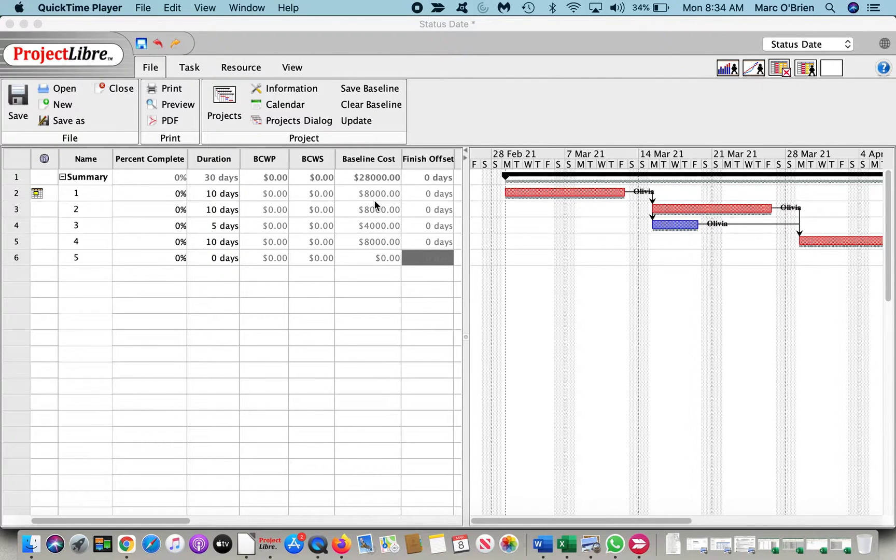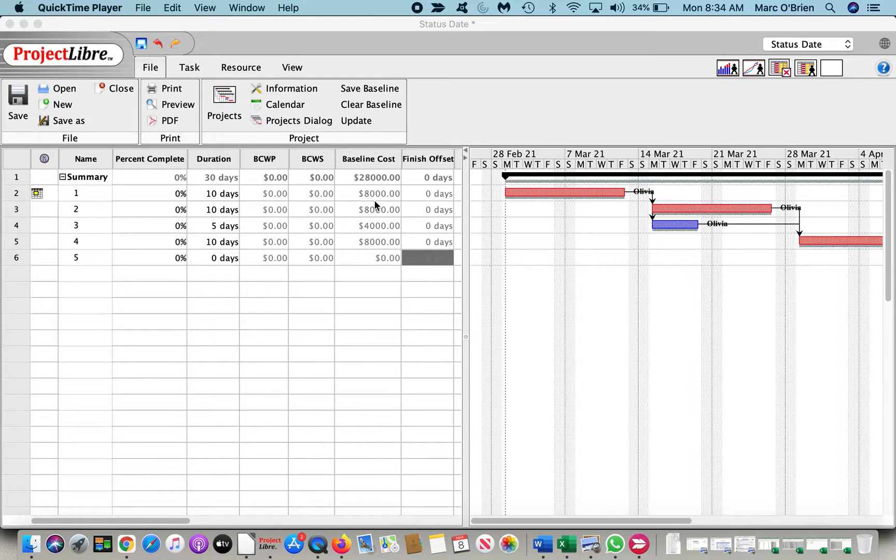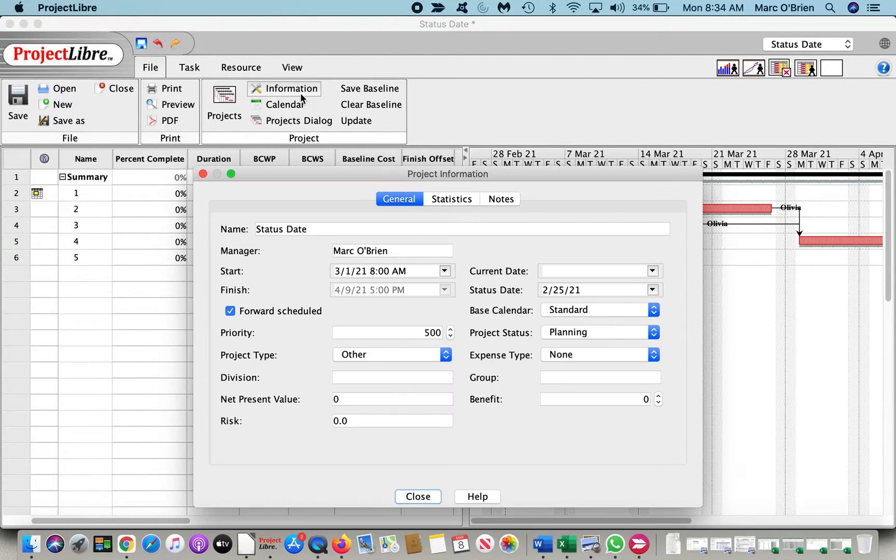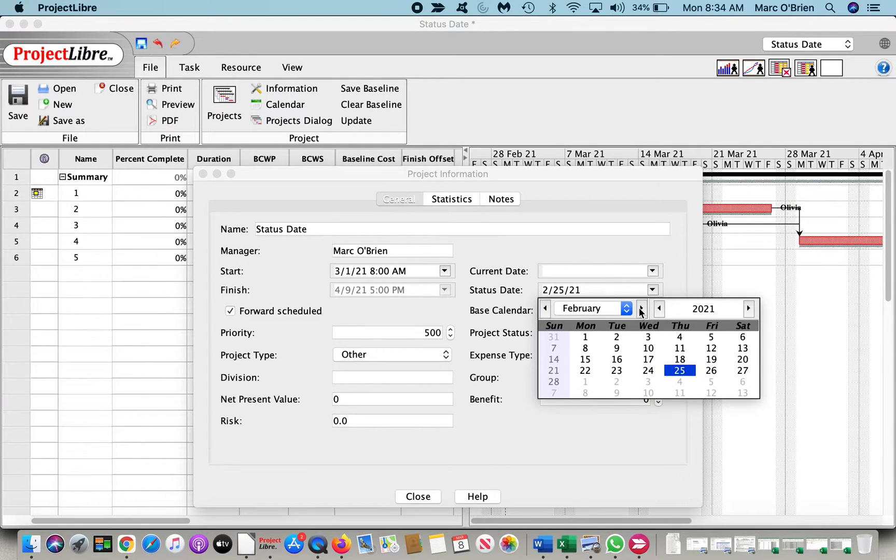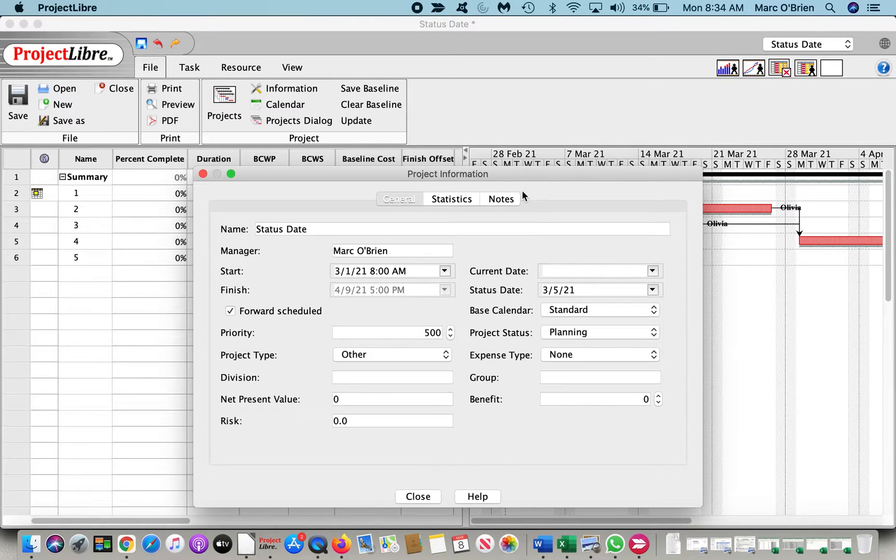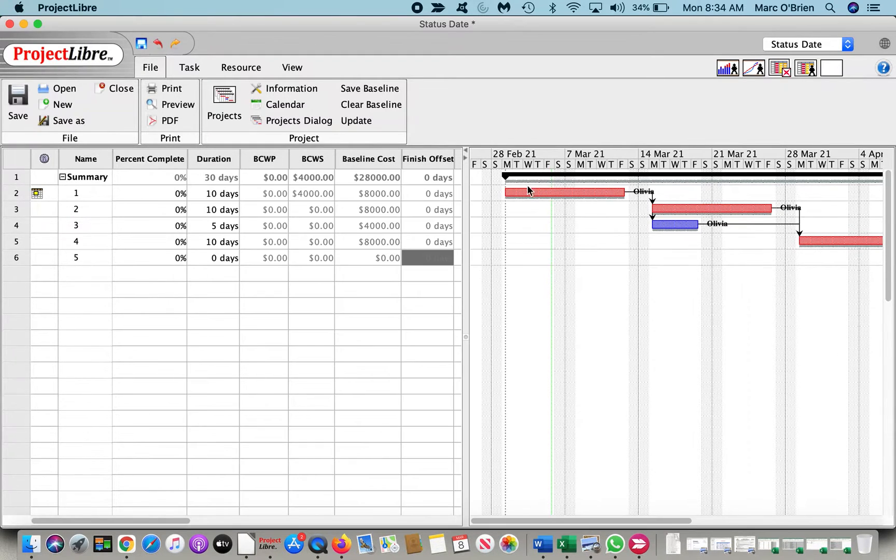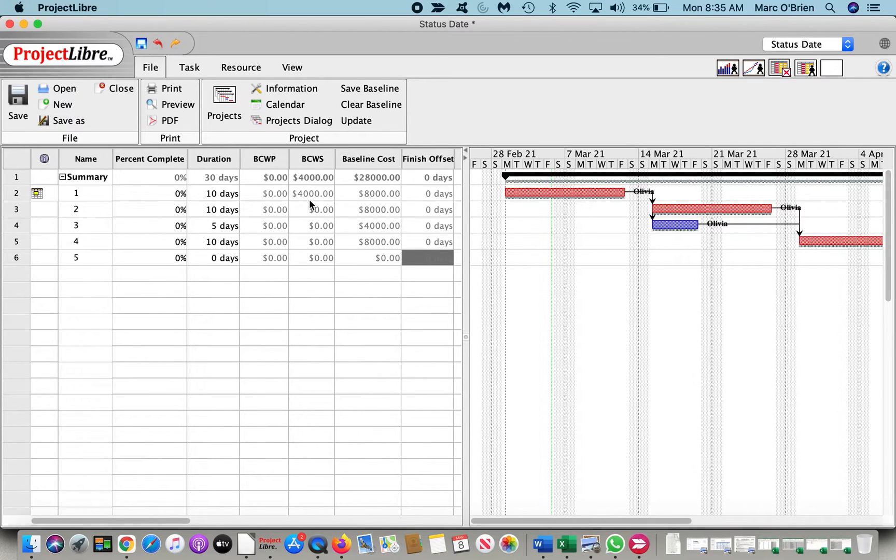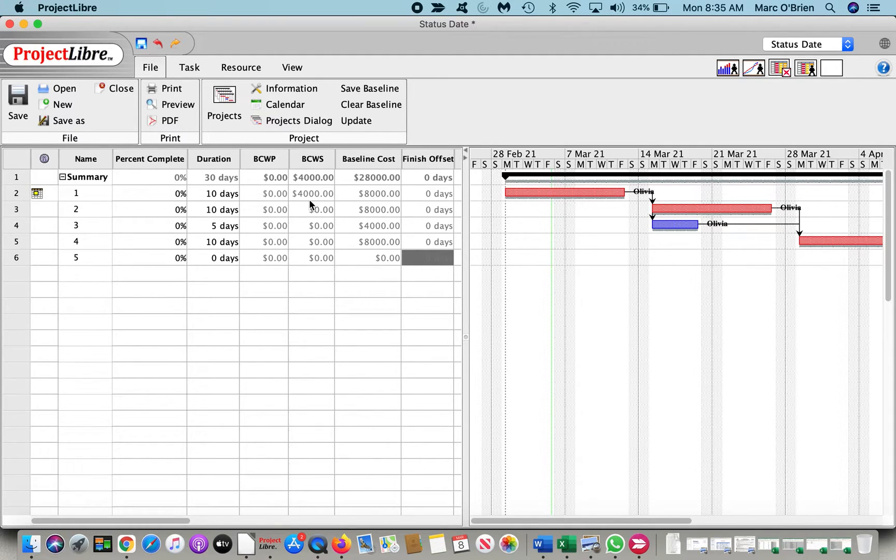It starts on March 1st, so on March 5th, 50% of the 10-day task should be complete. However, we need to set the status date to say we are calculating what percentage of the task is scheduled to be completed by a date. So let's set our status date to March 5th. And when we do that, you will see the BCWS is $4,000. The budgeted cost of work scheduled, meaning we should have consumed on schedule $4,000 in cost or 40 hours of Olivia's work if on schedule.